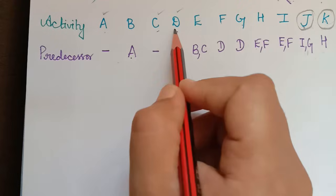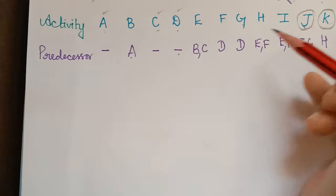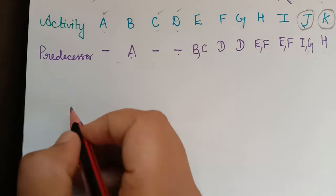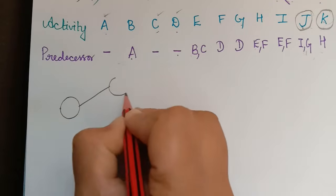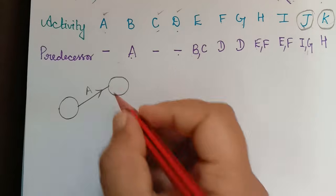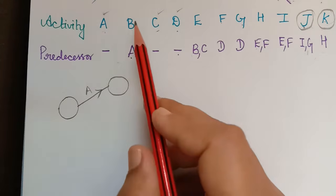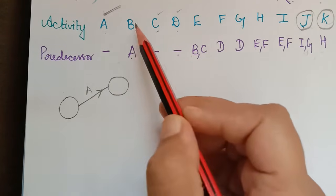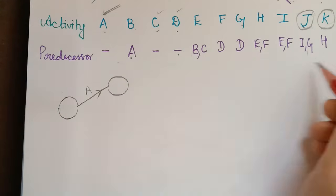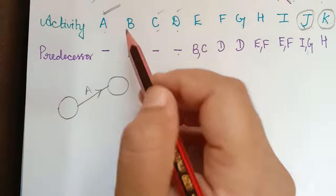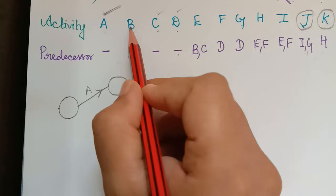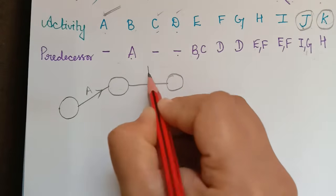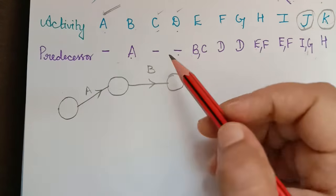We begin drawing the network. Starting with activity A, which has no predecessor. Next is activity B, for which A is the predecessor. So from the end node of A, we draw activity B. We will first draw a rough diagram and then make a fair copy.